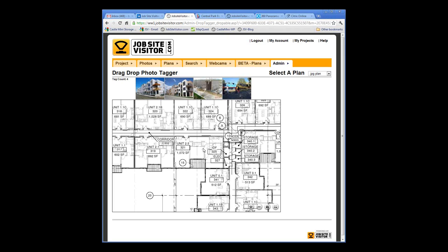But I think they're most valuable for tracking the progress and the as-built schedule and documenting that, because at the end of the day, when everything settles out, whether you had a great project or an okay project or a lot of problems, you're going to want to turn to that as-built schedule and say, this is exactly when we were in this area, and this is how long it took to start and stop these activities. Great. What types of construction projects are most likely to use this type of service, and which are least likely?